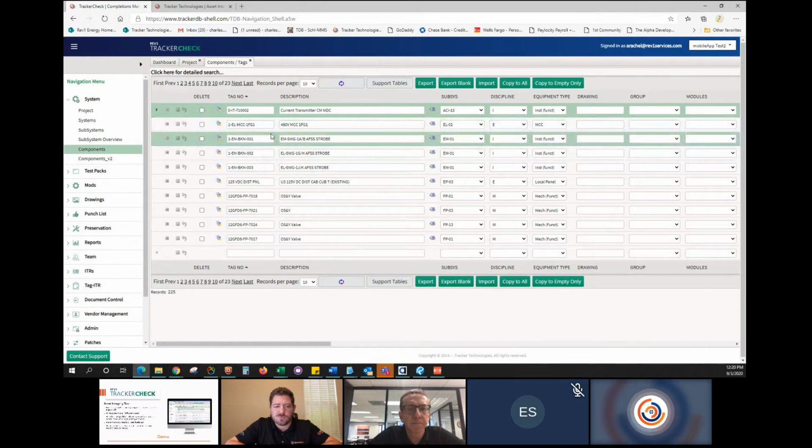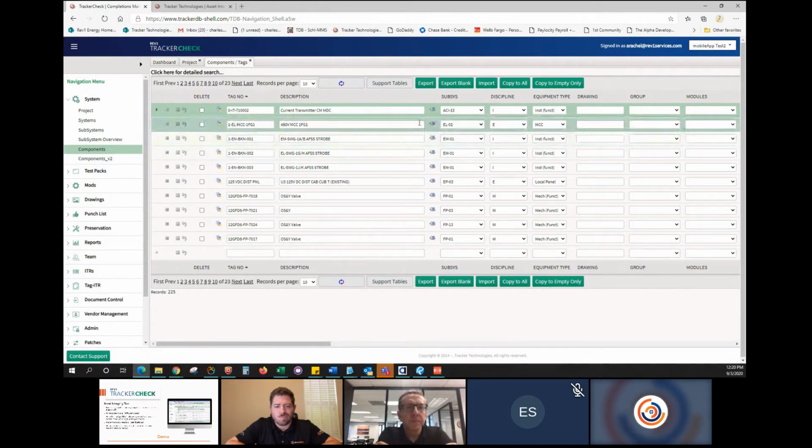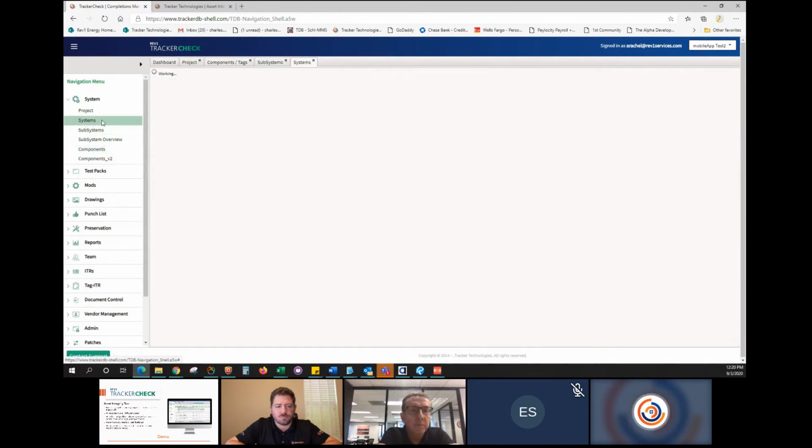But on a normal project, you get your engineering list, you compile them, you systemize them, you break them into subsystems, break those into systems. And so we're going to take a look at that real quick. Here we're showing that this top tag, which we're going to focus on, is in the ACI 13 subsystem. And if we go pull up the subsystem and then the system with it,